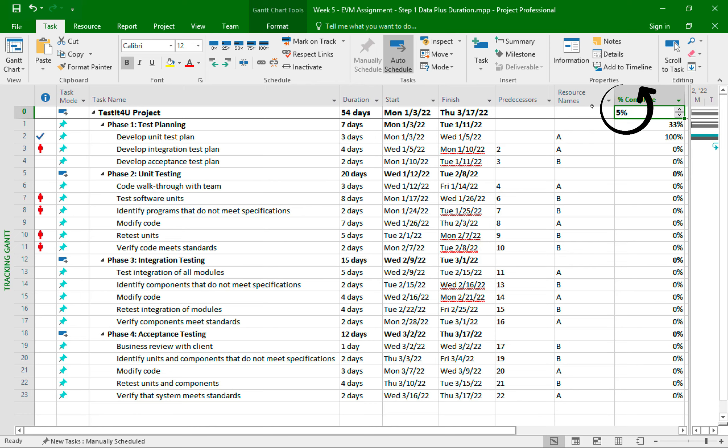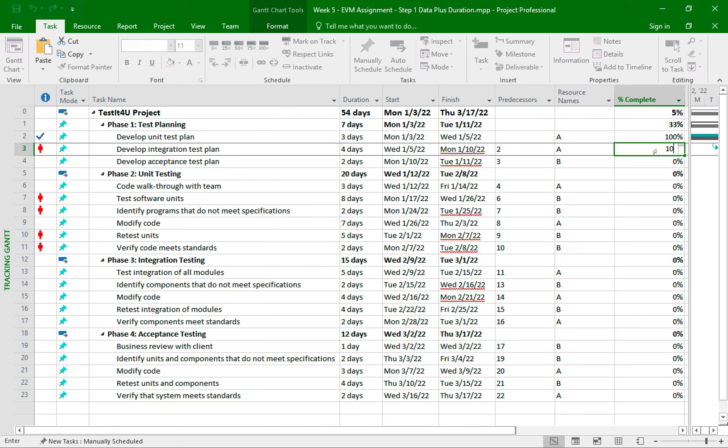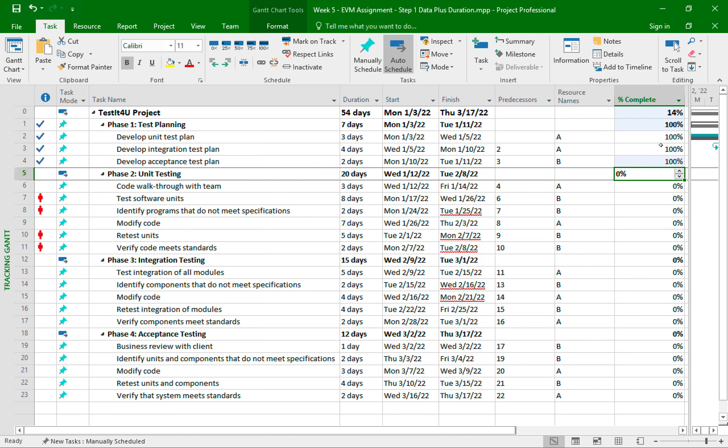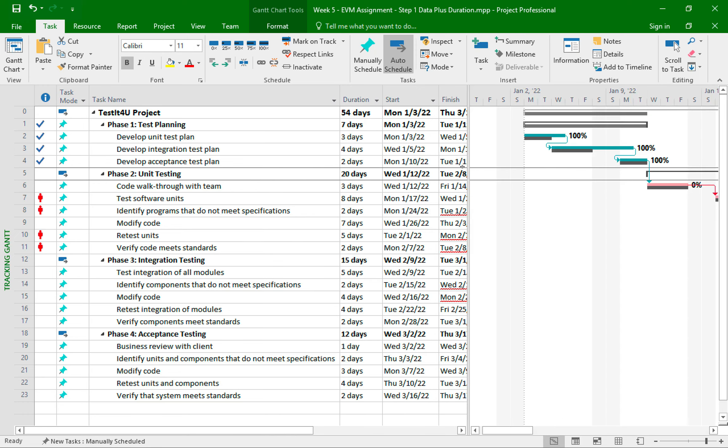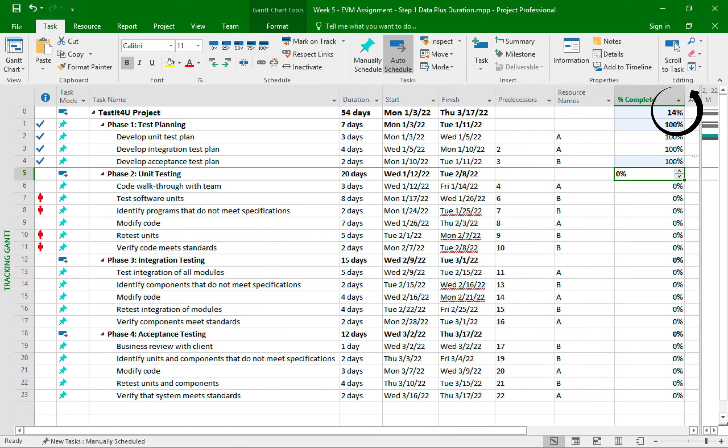Now since I have this column, I can simply type the numbers in each cell like this. And based on this update of these two additional tasks, now my phase one is 100% complete. And my project is now 14% complete.